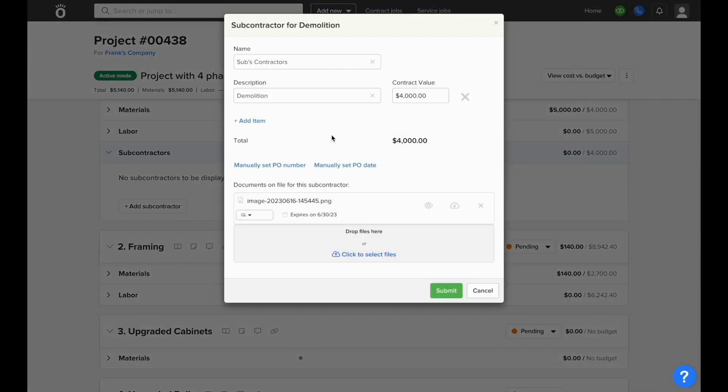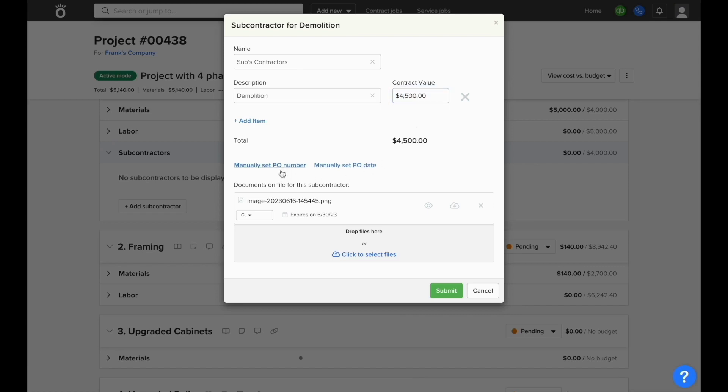Then we can enter in a description of the work that they'll be doing and the total value of the contract that we've signed with this sub. We also have the ability to manually set a PO number and a PO date as needed as the subcontracts will be managed through the purchases system.